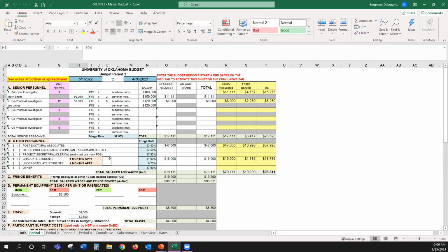Indirect cost is anything not specifically related to the project. Like supplies and equipment, you can relate directly to your project, but things like the personnel in ORS, the buildings, the parking lots, the electricity, that sort of thing that supports your project, but is not directly related to your project. So it covers anything like the running of the university, basically, is how I think of that. Okay. If there's no more, we'll go on to the budget periods.